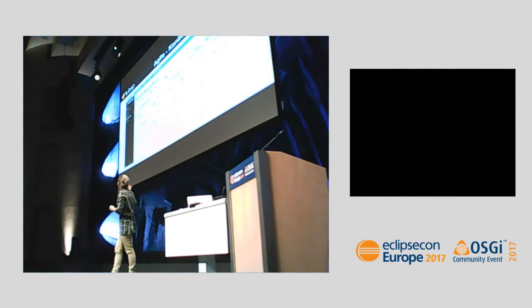So if you want to take a card and say, okay, I finished my work, I'm going to start a new one, you will be alerted that you should not do that in order to keep things fluent. So Kanban has to streamline, has to help you finish things, okay?